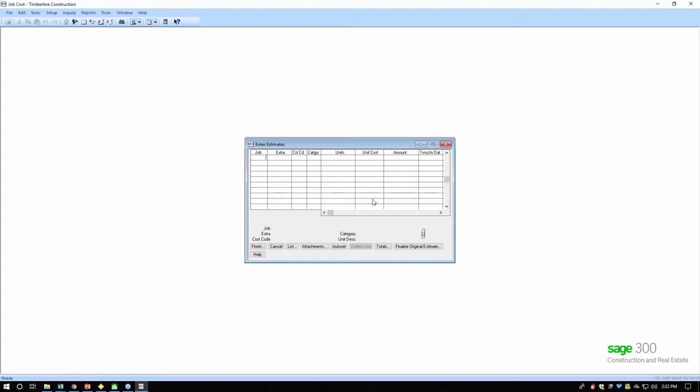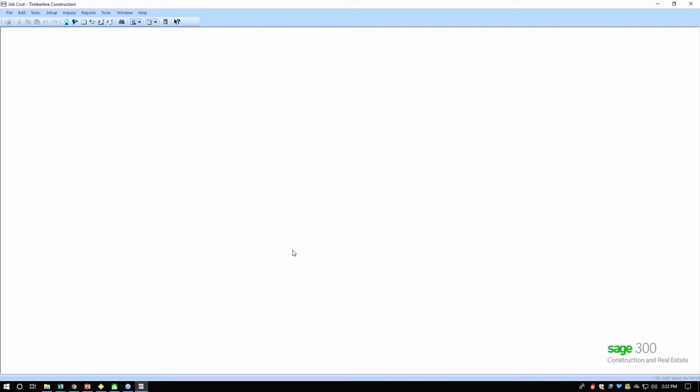But the other aspect that I never ever thought about is if I put $100,000 in here for something, when am I going to expend that money? I never thought about it. And I guarantee project managers generally don't think about it, but finance people do. It's cash flow, right? I'm not going to spend all $100,000 today. The more I can push out when I have to pay something, the better. And ideally, I'll have received money, or I've billed and received money, right? That juggling. And everybody on the call, if you have to deal with it, knows what I'm talking about. And that's the challenge of all this construction.